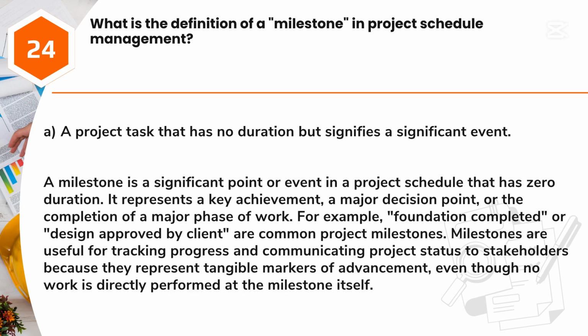Answer: A. A project task that has no duration but signifies a significant event. A milestone is a significant point or event in a project schedule that has zero duration. It represents a key achievement, a major decision point, or the completion of a major phase of work. For example, foundation completed or design approved by client are common project milestones. Milestones are useful for tracking progress and communicating project status to stakeholders because they represent tangible markers of advancement, even though no work is directly performed at the milestone itself.